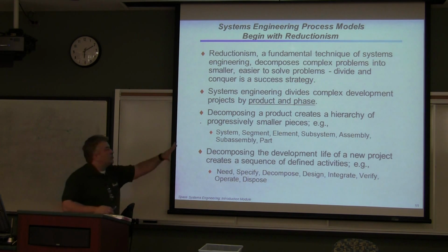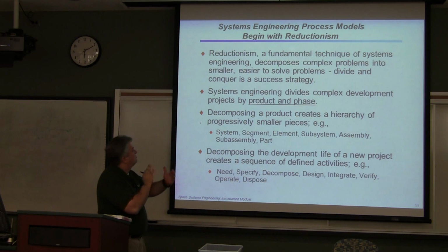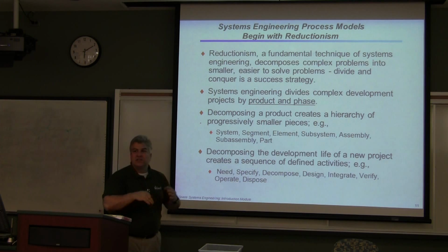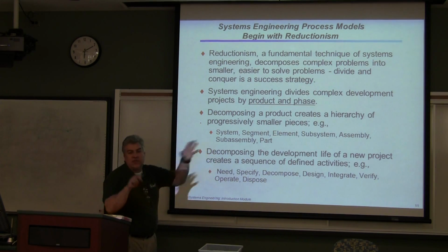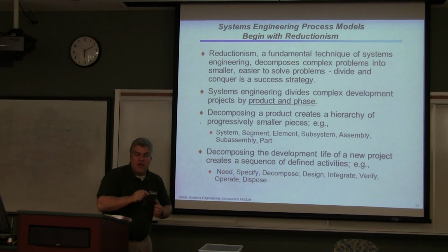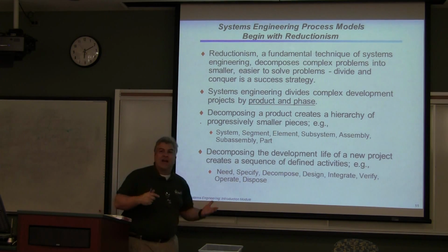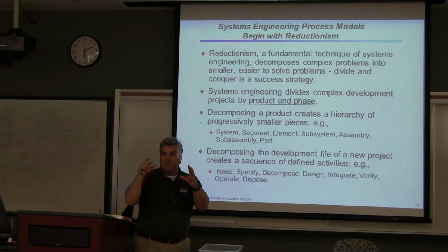And so what you'll do is reduce your entire project into smaller pieces. It might be in different phases, it might be different subsystems altogether. And then you could work within those subsystems, defining them even smaller. Again, it's a lot easier to build something if you work with a little piece and then build it up and up and up.